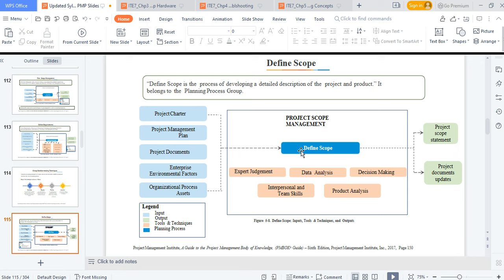To define scope, the tools and techniques include expert judgment, product analysis, decision making, and interpersonal and team skills. The inputs are your project charter — the document with the high-level sign-off for the project — and your project management plan. Without the project charter, you cannot start defining each scope item to be implemented. The output gives you a defined scope.